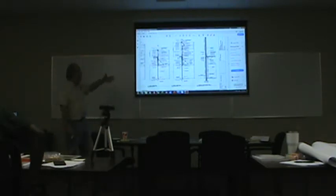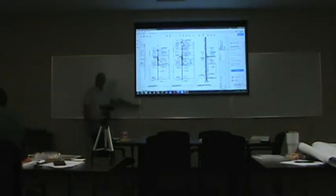Okay. Now I don't want to put my storefront in ahead of the overhead work, because of damage, quality control, okay? So we're going to move that further out in the schedule, so all the overhead work is done. So when we go through this, we got our sheathing up, we did our flashing, we did our ice and water shield, we did our masonry and brick, we did our EIFS, we did our brick, we came back, did our standing seam, we did our canopies, and now we're putting in the storefront. Now, while we were putting the roof on the building, what were we also doing?